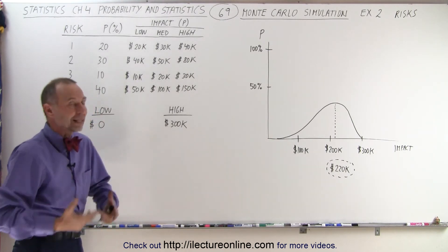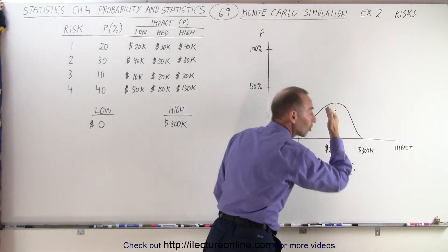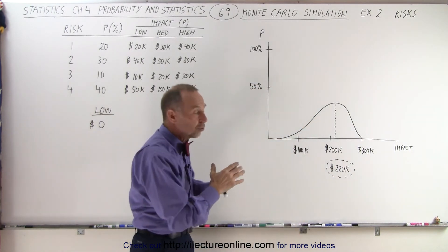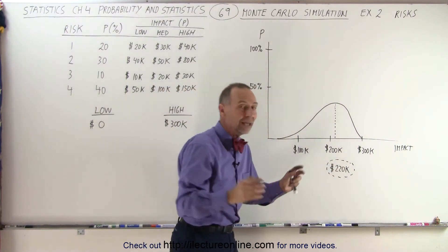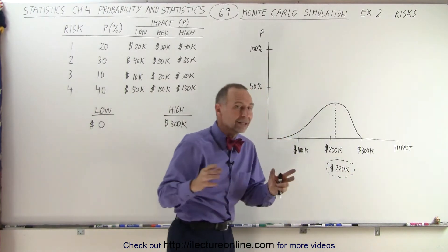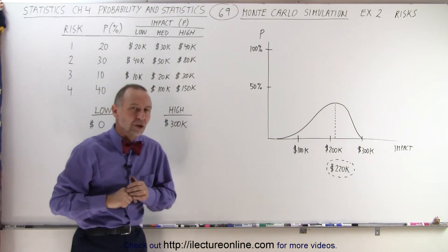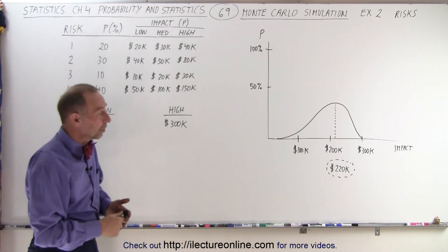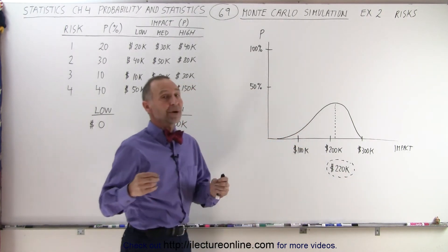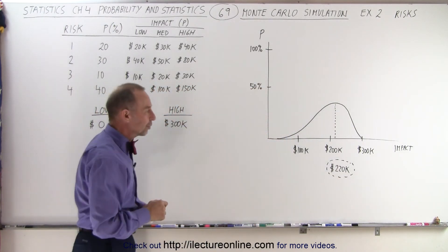Then we run the simulation many, many times over, and we'll get a curve that hits a maximum at some point. The most likely scenario is that the risks materialize to a certain extent and the cost to remedy them materializes to a certain extent. When we add all of that up, our simulation would show, for example, that we would have to pay an additional $220,000 to take care of all the risks that will have materialized at the estimated impact cost. That means we better have an additional $220,000 ready to go to take care of those risks when we execute our project.